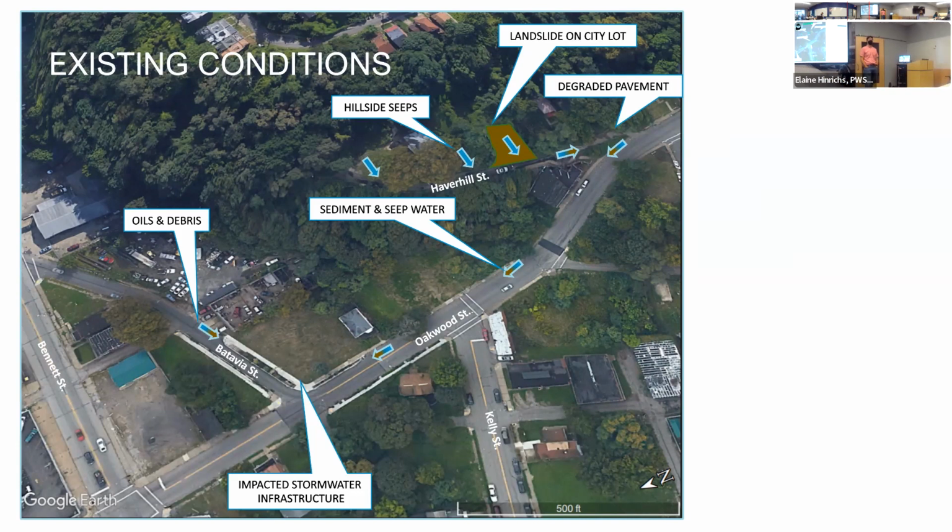I think you might want to adjust it to 3 meetings to go along with past history of doing this: the meeting as now, a second meeting with some of the ideas incorporated that people have given you, and a third meeting of what you're doing prior to construction. It makes people happier and it makes a healthier project for you guys. Yeah, there's a lot of that. So we'll definitely.